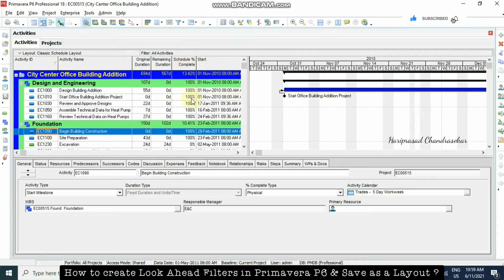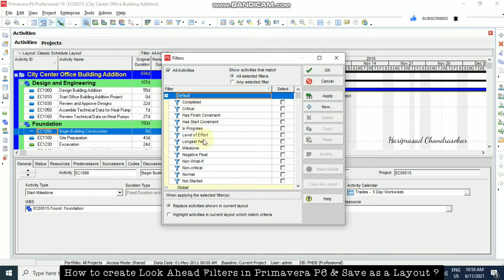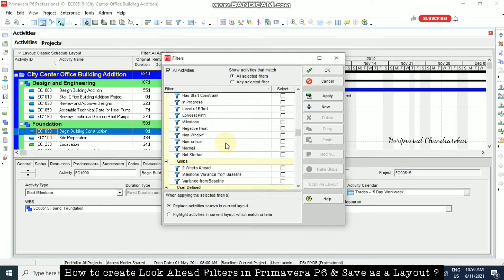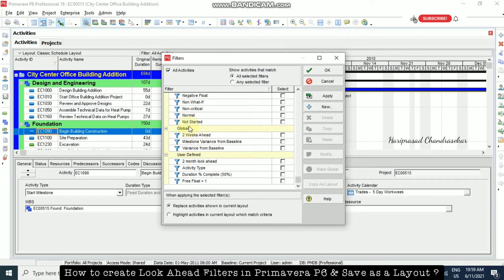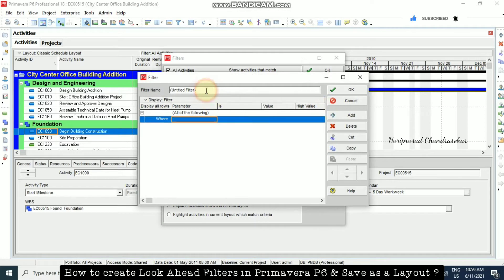Now we can just go to the filter icon. Here we can create our own filter. Already by default we have a two-weeks global filter. Now we are going to create our own look-ahead filter. I'm going to click New and name it as 'Look Ahead Filter'.